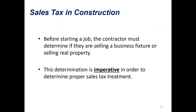As a contractor, before starting a job, the burden really lays upon you to determine if you're selling a business fixture or selling real property, and it's important to make this determination up front so you can have the proper sales tax treatment. If you're a contractor and you ignore this aspect and you're really selling a business fixture and you don't collect the tax, you open yourself up to a lot of exposure. If you go through an audit, you'd be subject to the taxes that weren't collected in addition to penalties and interest. It's really important that the contractor takes the time to treat it correctly.